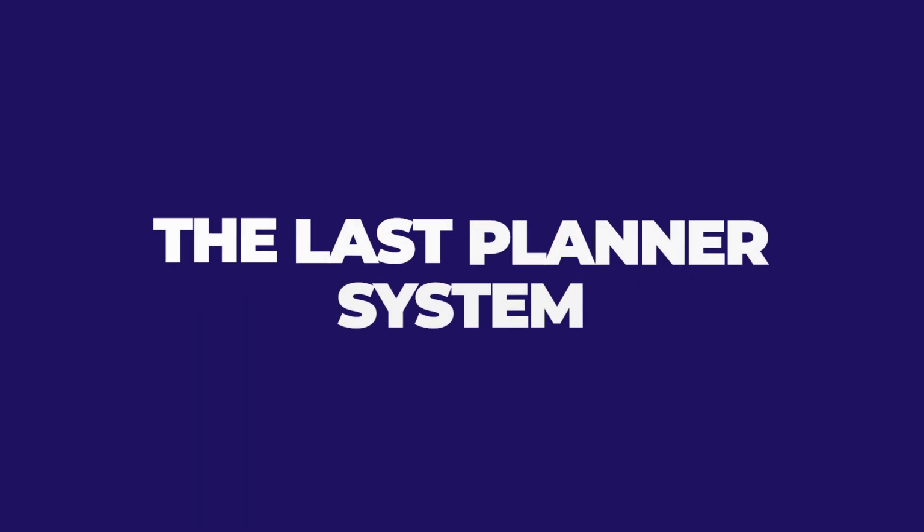And then the third system that I want to see in place is the Last Planner system. Do they have a way, the company, of engaging with their trade partners, really taking care of their trade partners, and controlling that project, boots on the ground with the superintendent and the foreman in a remarkable, visual, and lean way? If you have these three things, the project planning according to a production system that has flow with the last planners in the field, that company will be delivering a solid product, and that company is healthy.